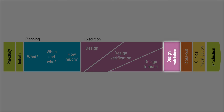When you have shown that your device is technically sound in design verification and have set up production, you should validate the design. Design validation should show that your product works as intended and that user needs have been met. Note that design validation is not the same as process validation or usability testing. If you are the project manager and not involved in clinical investigations or regulatory submissions, you can close down the project administratively. It is also a good idea to spend a few days working on lessons learned.